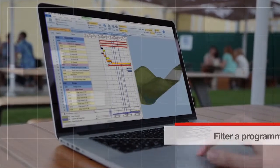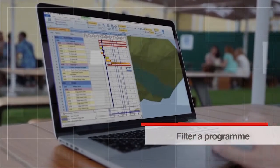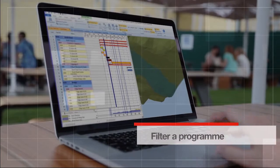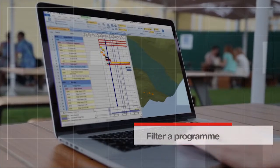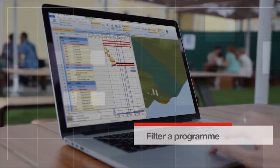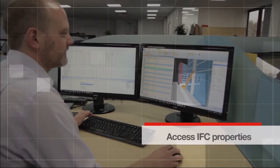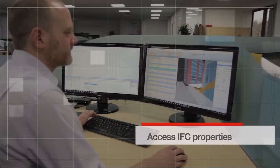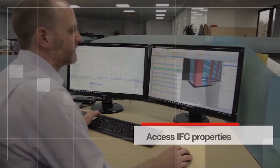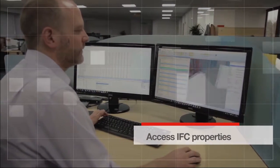Filtering a programme and timeline to show subcontractor or resource specific views. Accessing IFC properties to analyse quantities and dimensions and to inform estimates.